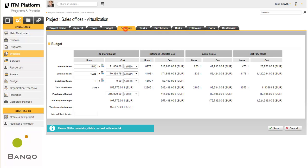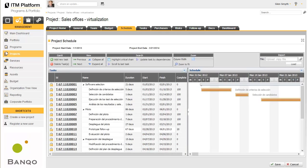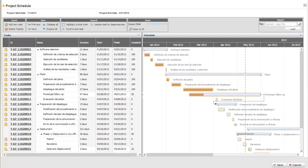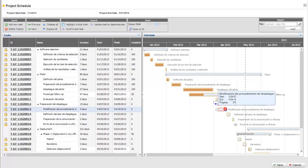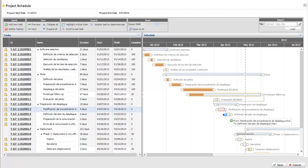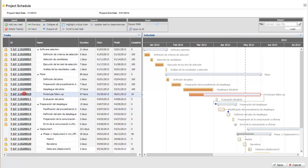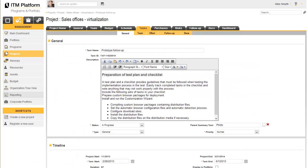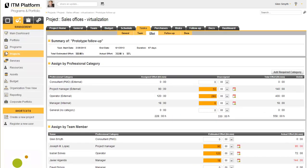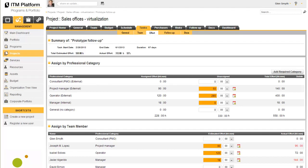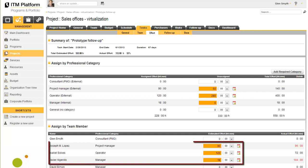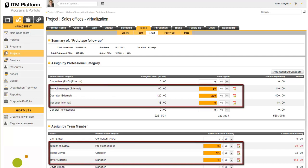The calendar includes a full Gantt diagram on which all task management functions can be performed either graphically or textually. Each one of these tasks has a series of sections that will enable you to assign tasks to your team and plan the estimated effort for each one of these resources. ITM Platform will alert you if any individual or group of individuals in a certain professional profile becomes overloaded.